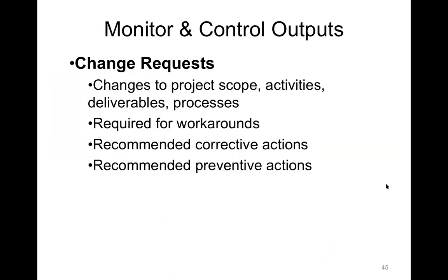Okay, just looking at change requests. Changes to project scope or activities or deliverables or processes or budget all require change requests. Change requests are required for any workaround plans, any corrective actions, any recommended preventative actions, anything that deviates from the plan. That requires going through integrated change control, likely going through a change control board and having any change request approved or denied from the integrated change control process.